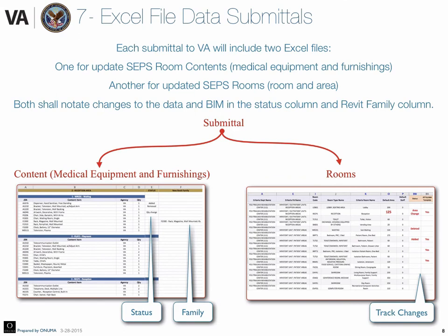And what we found, and this is so important because we found even in recent department updates, there are inconsistencies between the list in Excel, in the design guides, and in the plans. Small inconsistencies sometimes, or in many cases in the older department updates, you'll see pretty large inconsistencies because obviously if you're doing things manually and trying to coordinate this data across plans and elevations and lists, inconsistencies get developed.